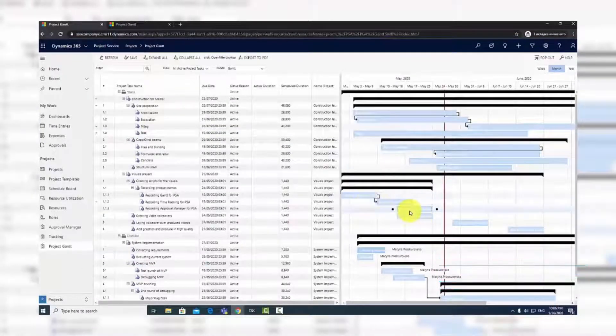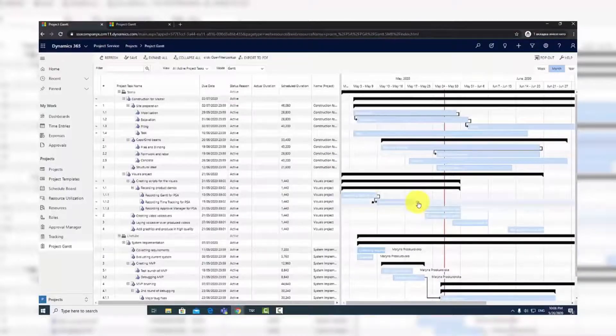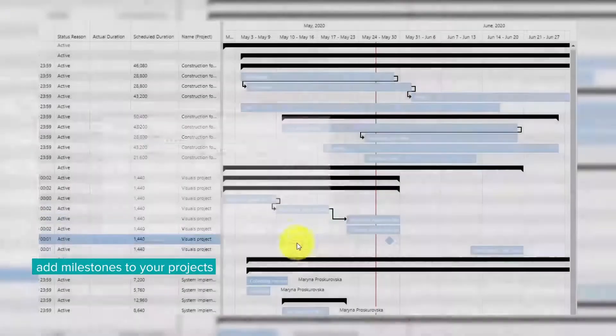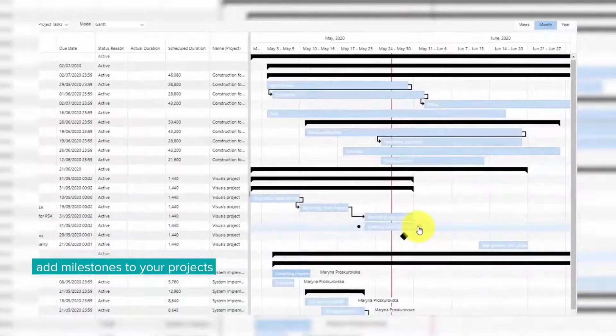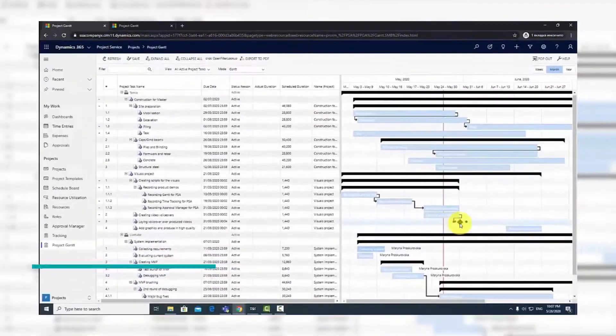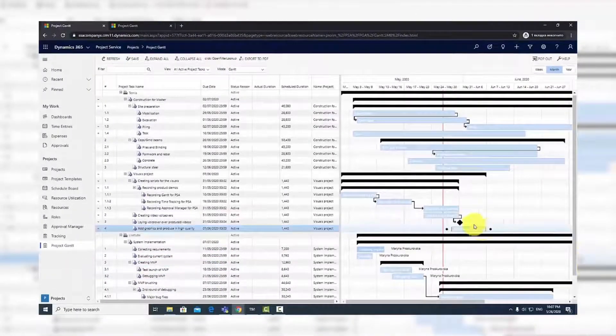You can also create milestones on the projects. Simply choose the milestone option in the Project Task window. To assign a resource to a project task, right-click on the task to open the menu.